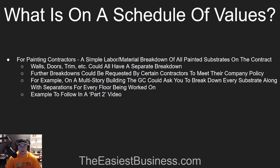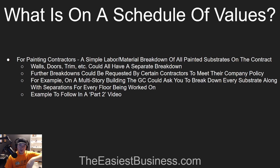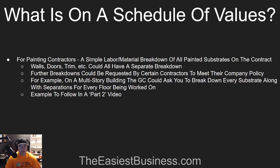So you're literally going to have to reverse engineer your bid. These don't always have to be 100% accurate — they just have to total the contract amount. So if you have three floors with 30,000 square feet of walls, just divide your wall square footage by three, put a price on each one, and there's your wall number for every single floor. If you have like a lobby and then floor two of a hotel with guest rooms, you'd have different numbers — I would just take the wall square footage and do percentages. Like five floors, five times 20 is 100, so 20% on each floor. If floor one is smaller, maybe do 15% and make the others 21%, as long as they equal 100% of the walls.